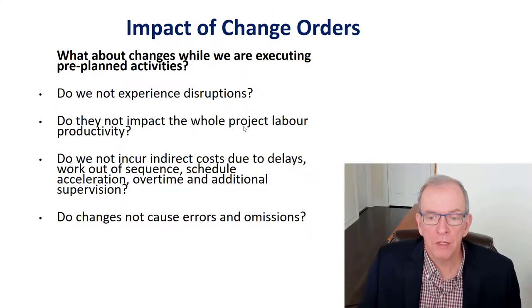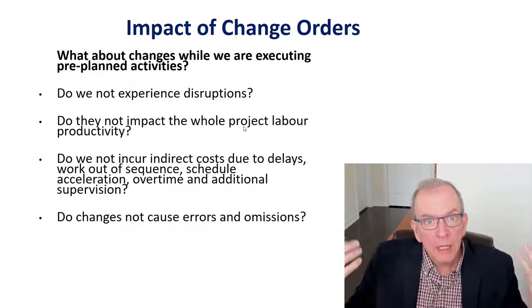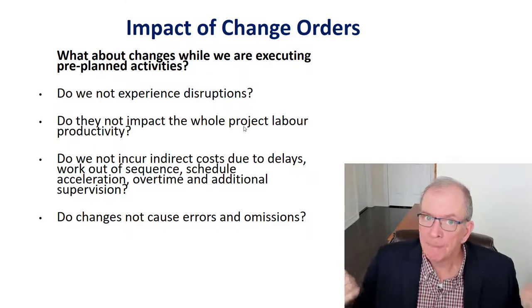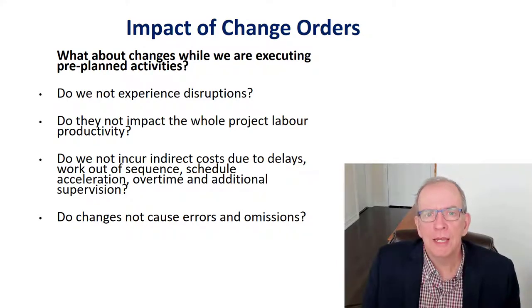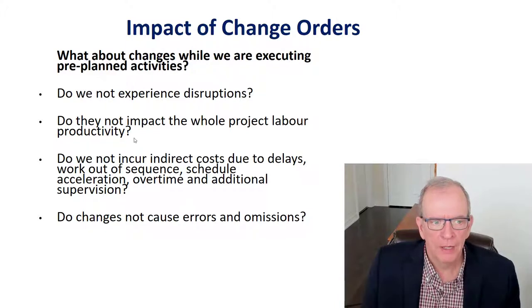Labor productivity, project stops, trade leaves the site. Do they come back exactly when we need them? If we actually disrupted their work, probably not, because they've started somewhere else. So that's even a further disruption, a further ripple effect. Does that not mean we're longer on the site as a result of that? Isn't there, as we've talked about, a per diem cost of every day you're on the site?